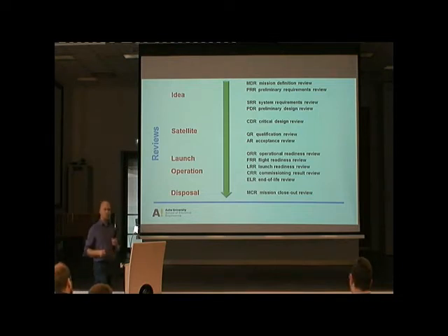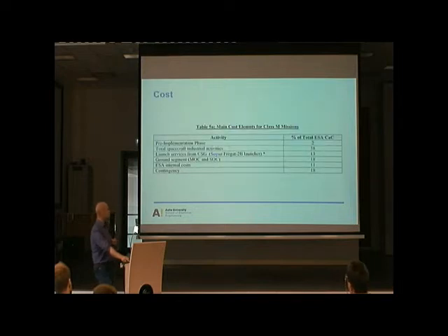Most probably you don't have to have as many reviews as in a big space project, where after every major phase you have a review, and either after the review you can continue with the next phase, or you turn back to the previous phase, do some error correction, go back to the review and then proceed to the next phase. But review is something really important. This is the calendar which is actually making the pace of the space project.